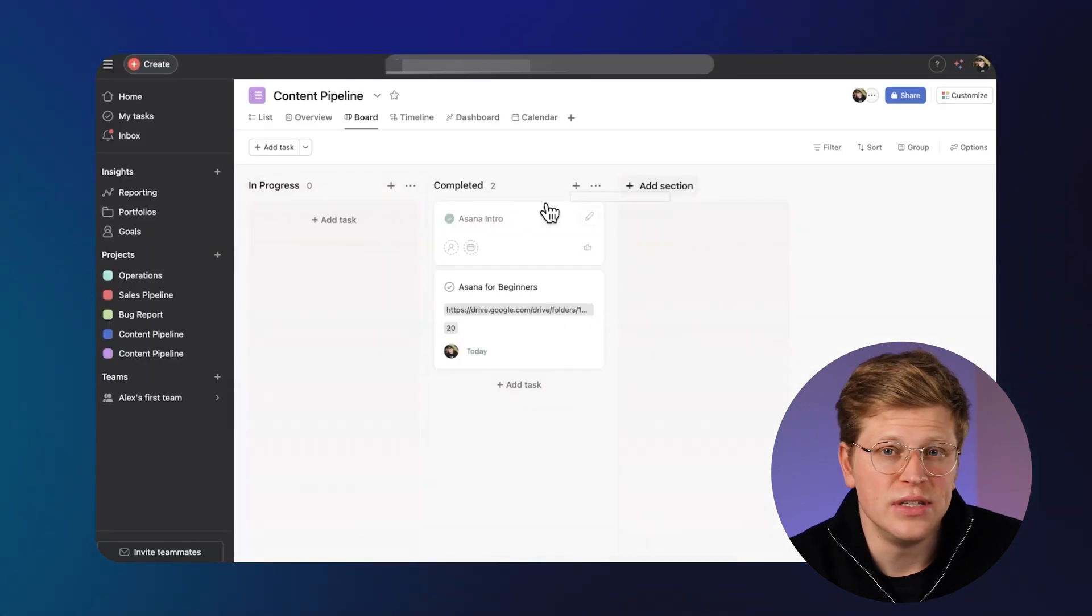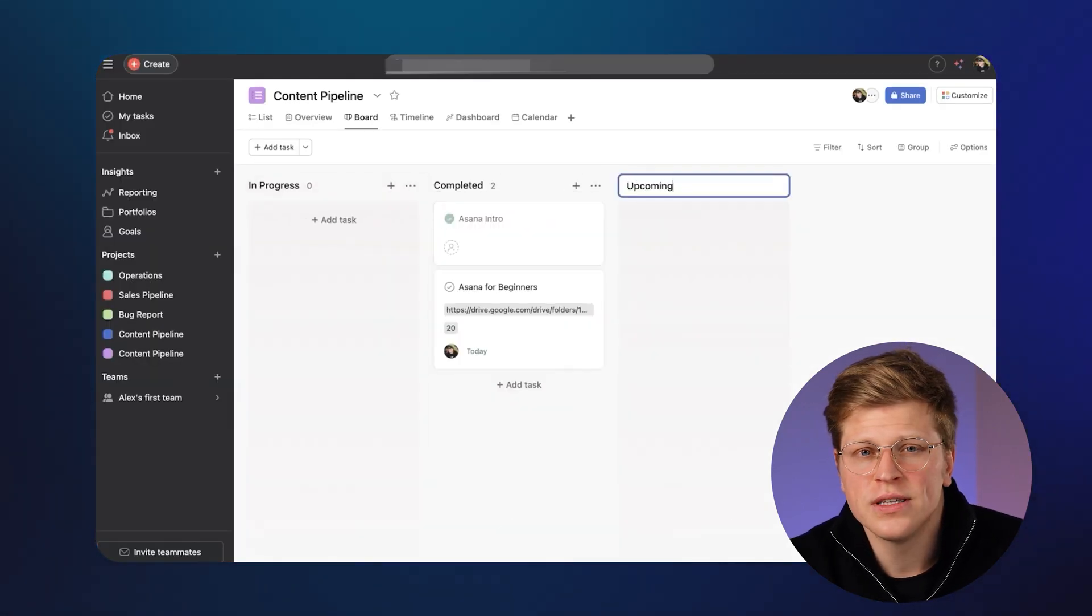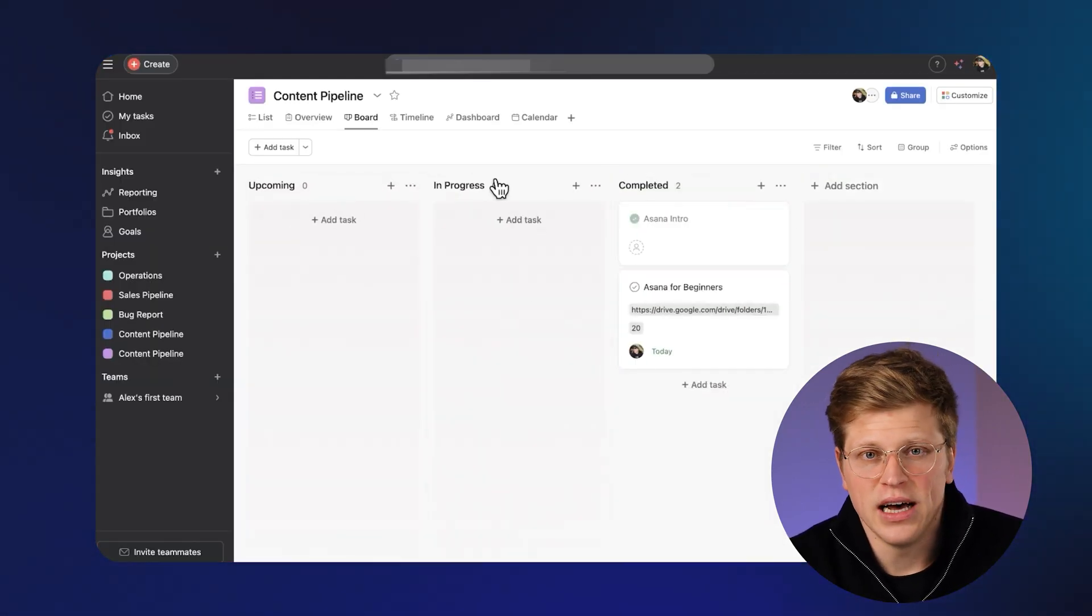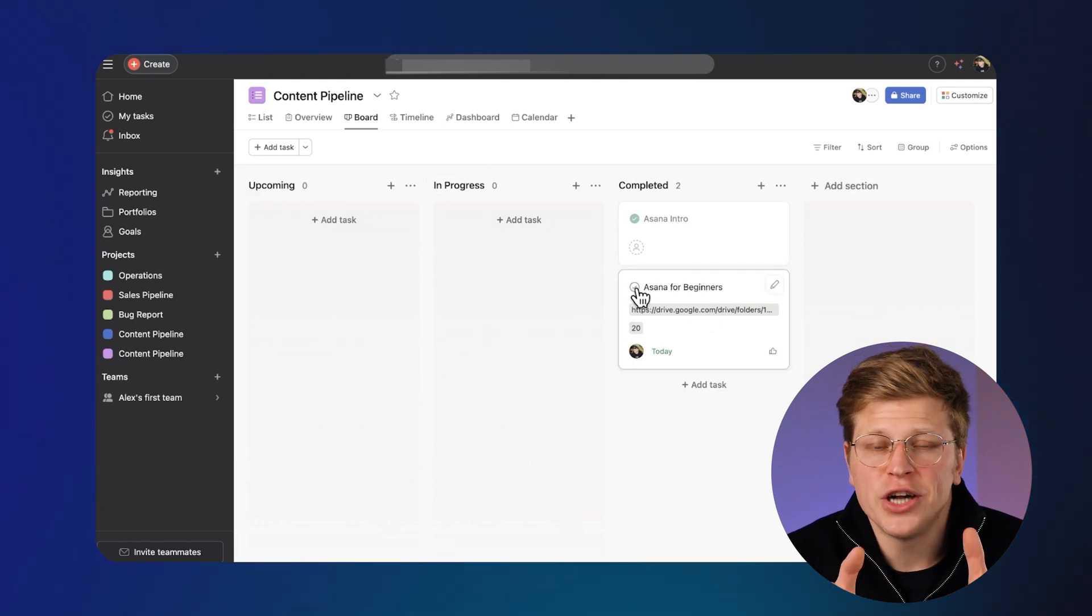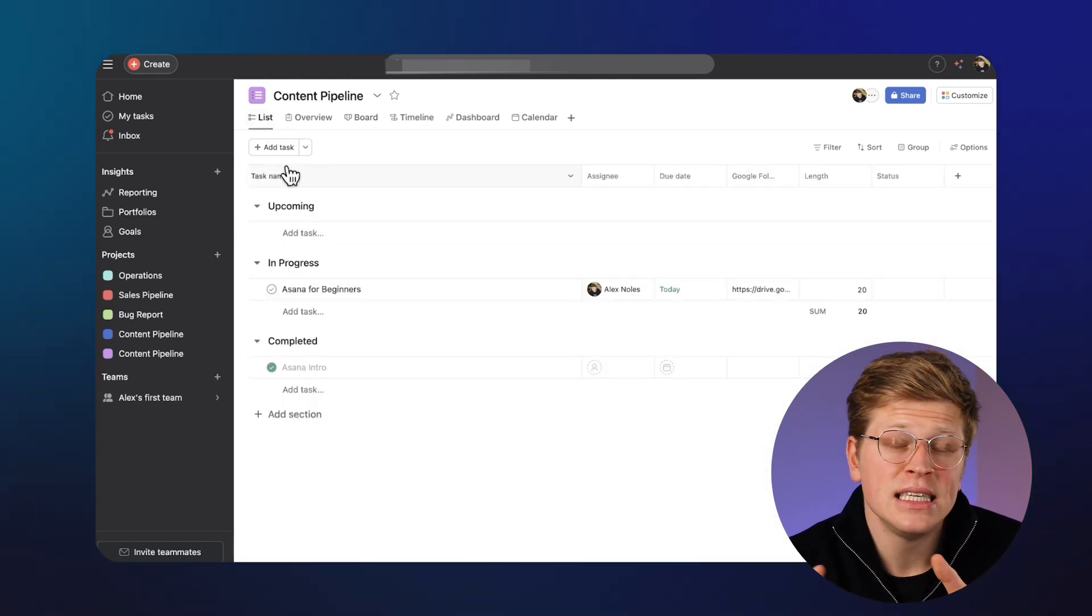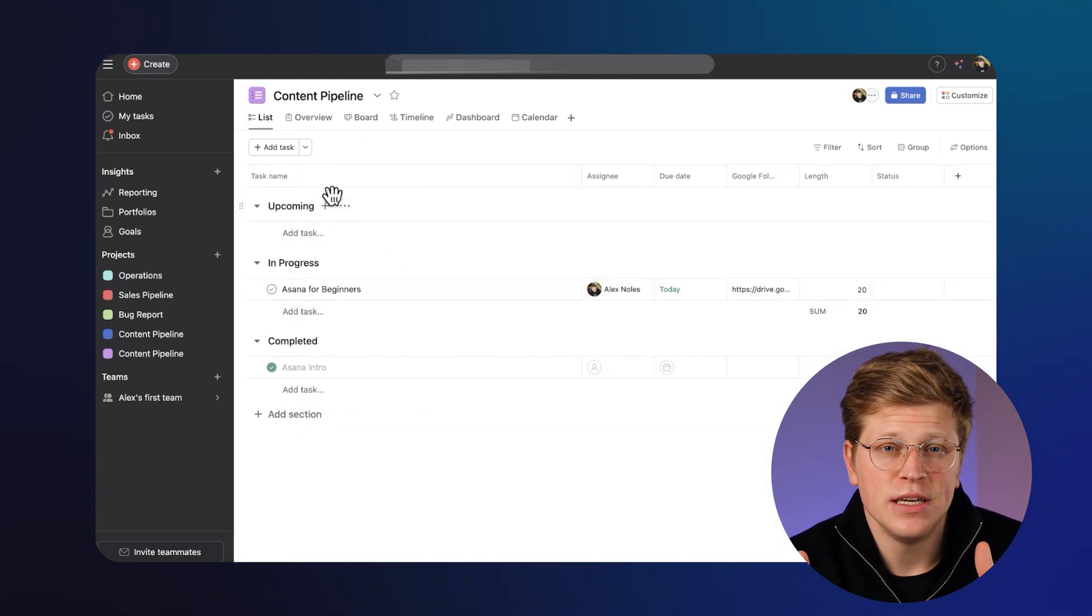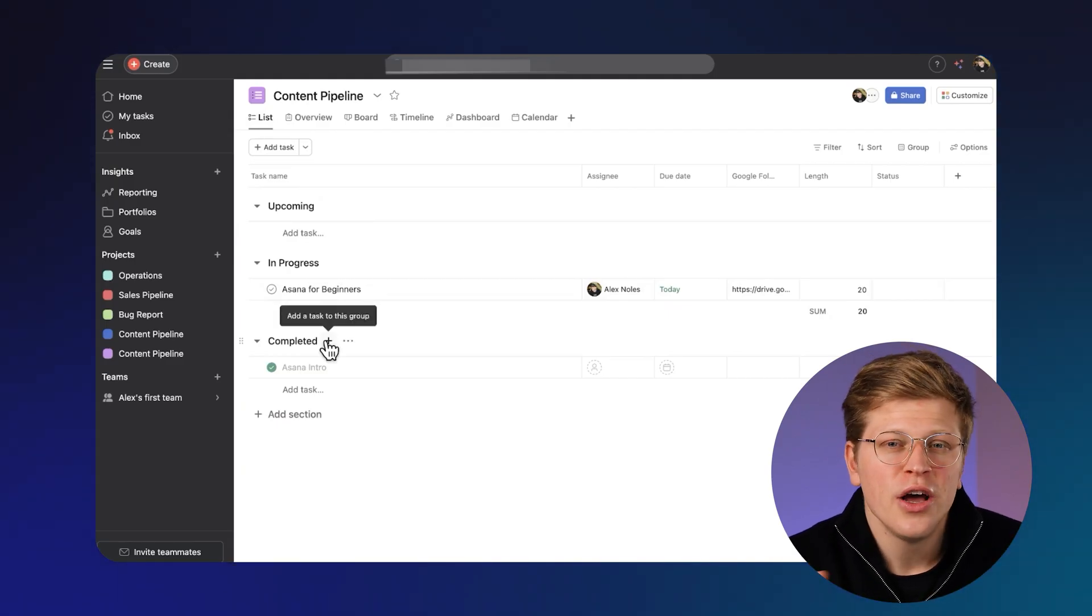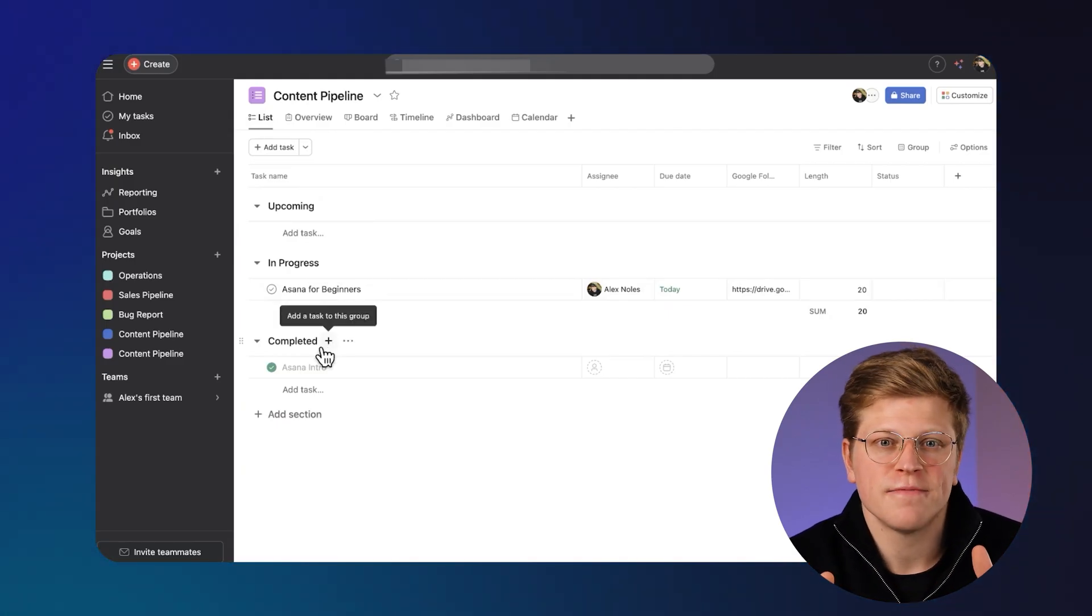Asana gives you task lists, Kanban-style boards, calendar views, and timelines. You can break big projects into smaller tasks, set dependencies, and use recurring tasks. It's great for planning and execution without getting overly complex.